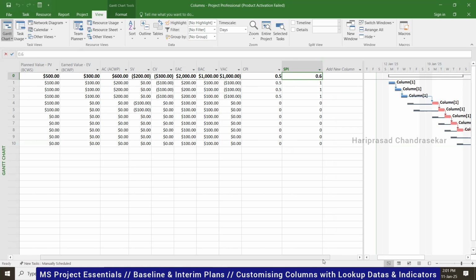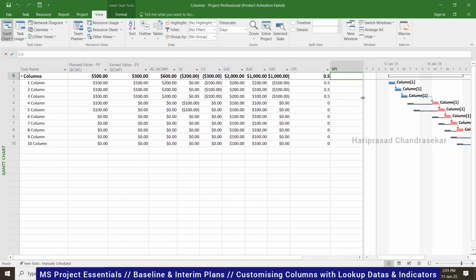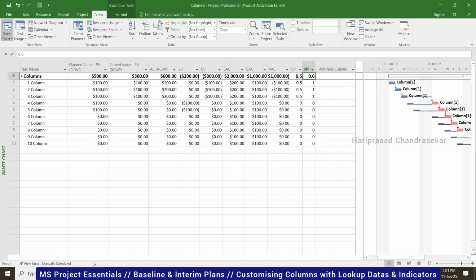Yeah, I understood. I have only one doubt. Percentage completion, can we check it based on the duration, or otherwise the weightage of cost? No, weightage of cost will not come out correct. You need to consider the duration. Actually, it's up to you. Sometimes you can consider the cost basis, and for some activities we can consider the duration. Yes, exactly. It depends on the task. Either you can consider time-wise completion or cost-wise completion, but both should be registered.